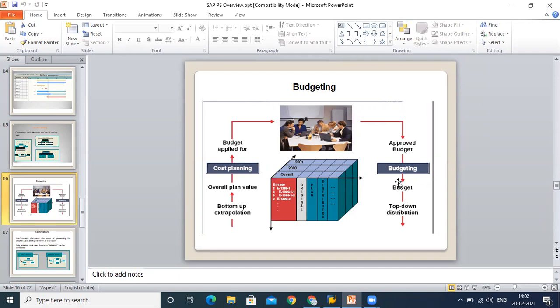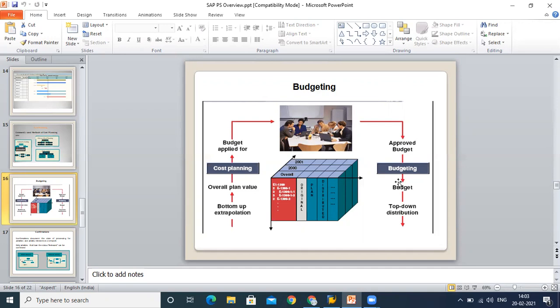I can mention budget at the civil level. Let's say my total budget for civil is 10K. Under that civil, I can have sub-WBS also, because in PS that is a hierarchical structure. You have one WBS called civil—we can call it a parent WBS—then that parent WBS can have multiple children. Civil is a parent, and under civil we can define PCC as child one, RCC child two, road construction child three. Our total budget for civil is 10K, and we can further distribute this 10K into the children.